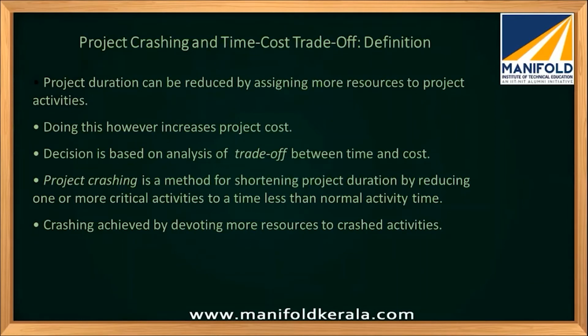So if I want to do that, what will happen? There will be a cost associated with that, because how will I reduce the total time? By allocating more resources to a certain activity, or I can put more men into that particular work, or I can hire more people, or I can give it to some other companies so that it can be done. If you do any of these, it is going to increase your cost.